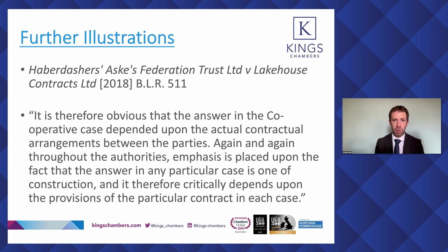If the contract requires one party to obtain a joint policy, particularly with a waiver of subrogation provision, a failure to do so by that party might be irrelevant so far as the liabilities between the parties is concerned. And I've certainly had cases where either for the employer or the contractor, probably primarily for the contractor, we could mount a defence and point to a joint insurance obligation on the other party, which hadn't been observed, which had been breached, but which gives rise to a defence to any claim by the other party.